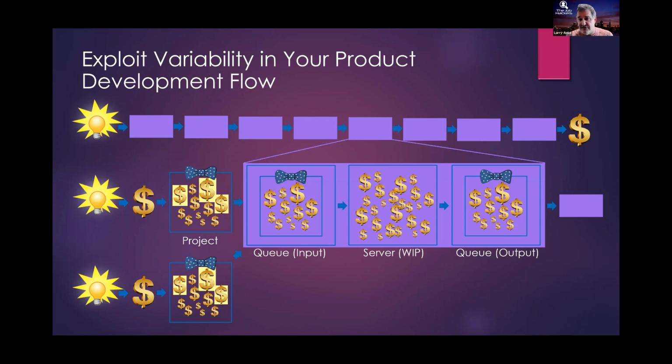Each one of those pieces, though, like items in our backlog, will have a variability in terms of their value and effort, right? We should not consider the project or the accounting code when doing the development of the product. We should consider the dollars and cents, the economics of it. We should do the highest value to effort items first, regardless of which project they're from. But that's not the way project management works, especially in waterfall.